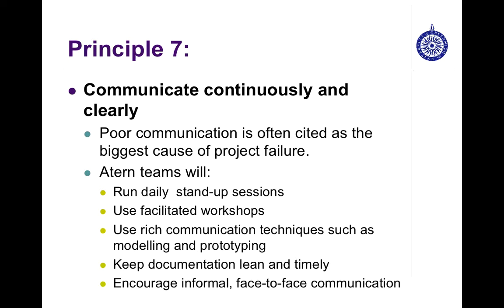And in order to communicate continuously and clearly, we have some methodologies like role-based stand-up sessions. That means a quick meeting of 10 or 15 minutes. And use facilitated workshops. We have done this before. We will arrange a meeting of around 1 hour with key stakeholders from the user representatives and from the development team as well. Then we sit together, discuss and make decisions on some key points.